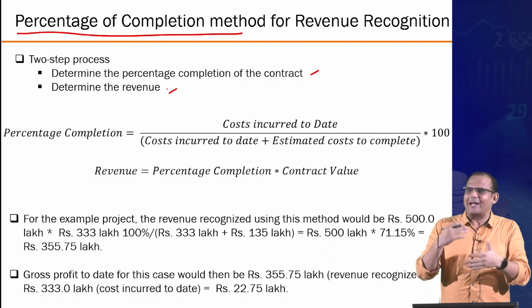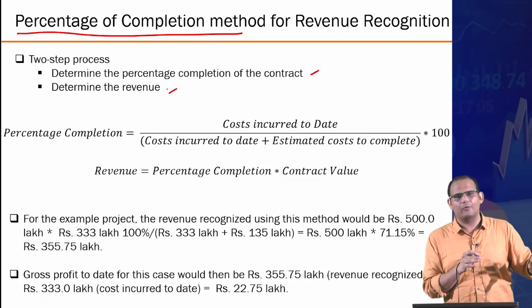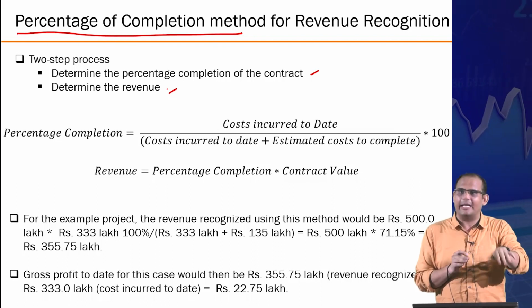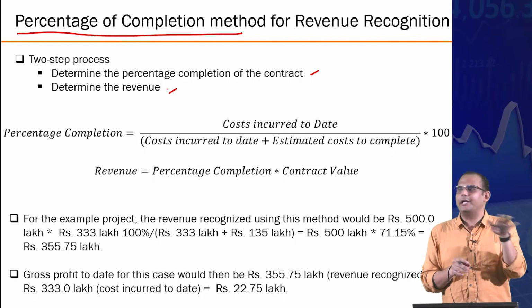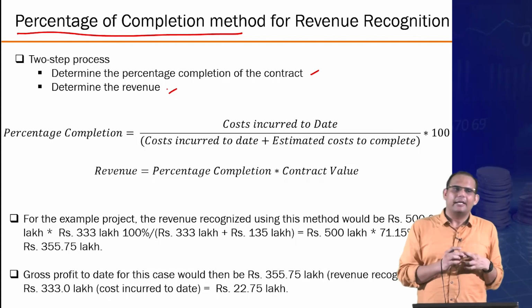So you have some idea, okay, total, you have a predetermined estimate. My foundation work was 10% of the total contract. My pillar work was again another 10% of the total work. So I know that, okay, total 20% of activities has been done, right? Any other ideas?